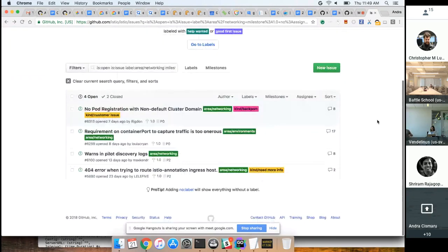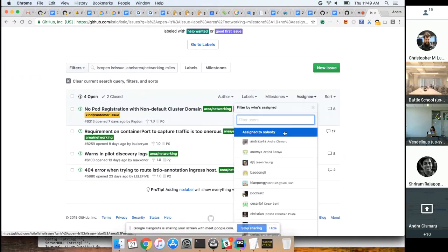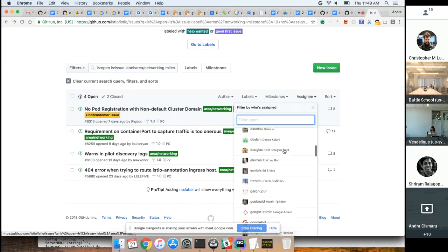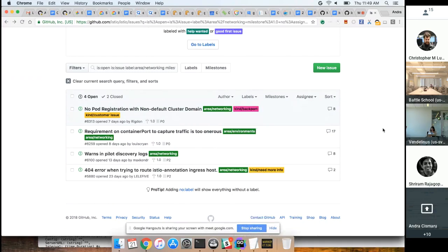And if not, they would close the issue as stale, because most of them were pointed at like the 0.7 or 0.4 release. And we had asked them to upgrade to 0.8 to see if the issue still persists. But if they don't respond within 10 days, we just close the issue. Yeah. So we're going to have the stale bot stuff. Christopher kindly kicked off that process. I was talking to Seb this morning about getting that turned on.